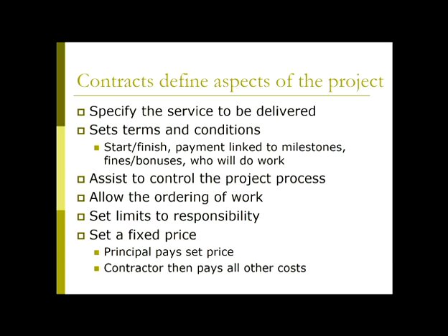So the set price is fixed. The principal who wants the job done pays the contractor, and then the contractor pays all subcontractors and any other requirements they have, like materials, out of that price.